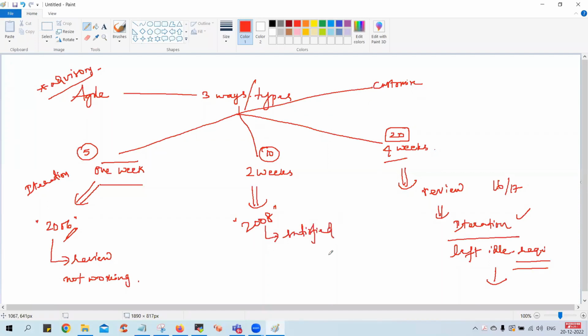with this proposal. So in the 2 weeks model, what happened is we'll take some items and we work for 2 weeks. That is roughly 10 working days, right? And whatever items they finish, they're happy. And whatever is left out, they will move to the next sprint or next iteration. You got it? So a lot of people seem to be satisfied. It is not great, not bad. So this got a credit rating of good, you can say.